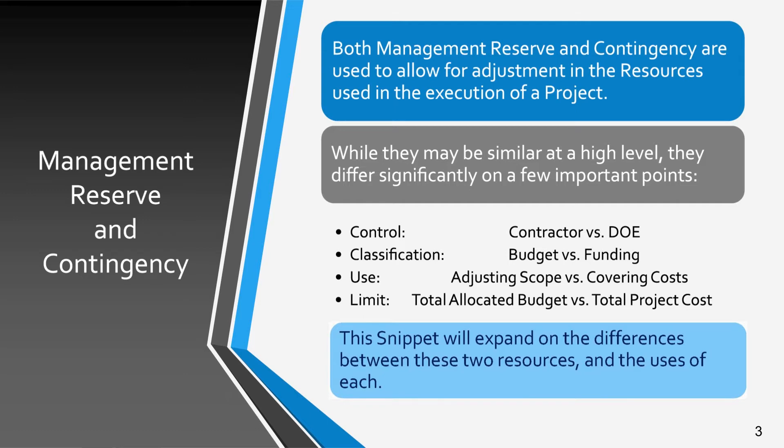The amount of MR budget held by a contractor is limited by the contractor's total allocated budget, or TAB, while the amount of contingency funding is limited by the DOE total project cost, or TPC. This snippet will expand on the differences between these tools and the uses of each.